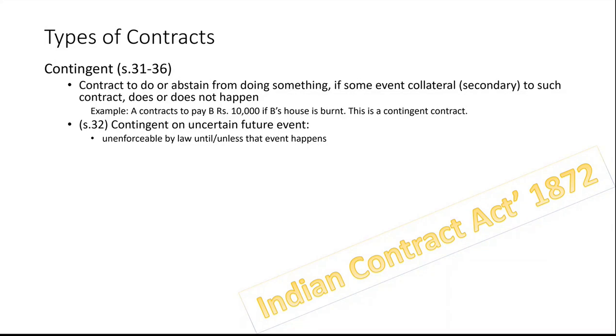Do LDs come under this? Why lease? LDs. LD is purely a penalty. I'll cover that also. You might have great confusion about what LD is, why the supplier is objecting to the LD, why he negotiates the LD. As per law, the party who is giving service has no right to dispute LD. Since you said it is an uncertain event, it is not certain that the person will delay. We are putting that term in the contract, saying that if this happens, we will be penalized.